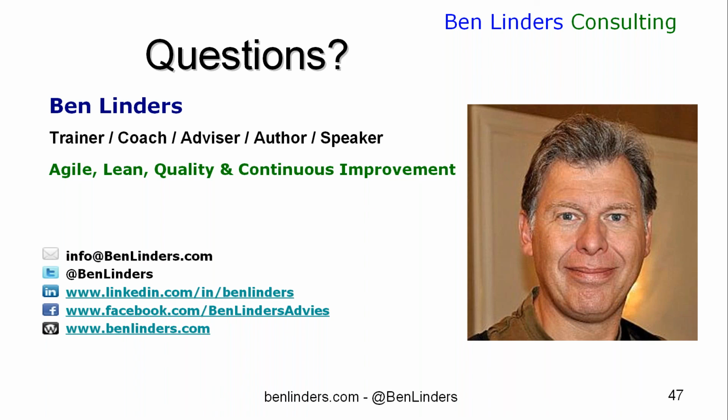The next thing, however, is to take time to learn from this, to look at what happened and find a way to learn from the problems that you had, to look at how you solved these problems and think about things that you can do better in the future when a problem like this or several problems happen, and also explore what has been causing these problems in your organization. Look at the causes. They might also be causing other problems. A lot of things go back to some common causes which are causing a lot of problems in your organization. You want to find those causes and address them to become better.